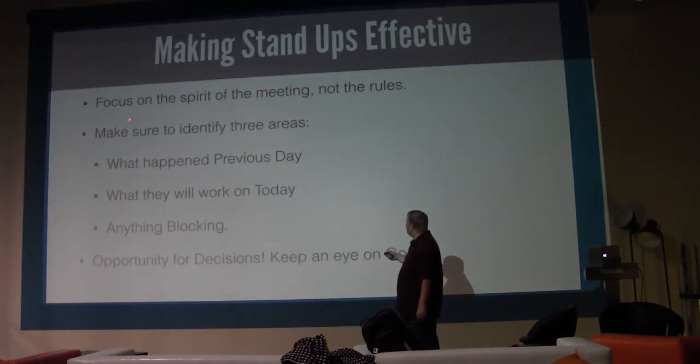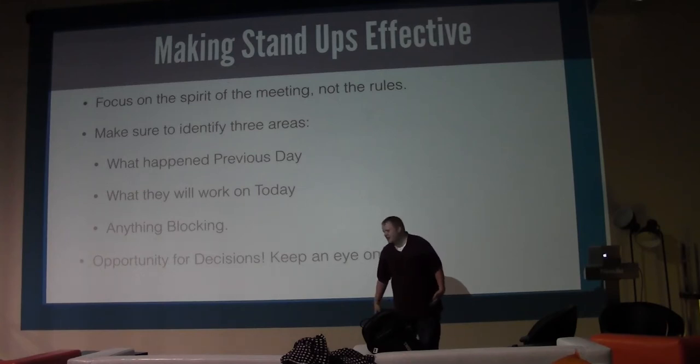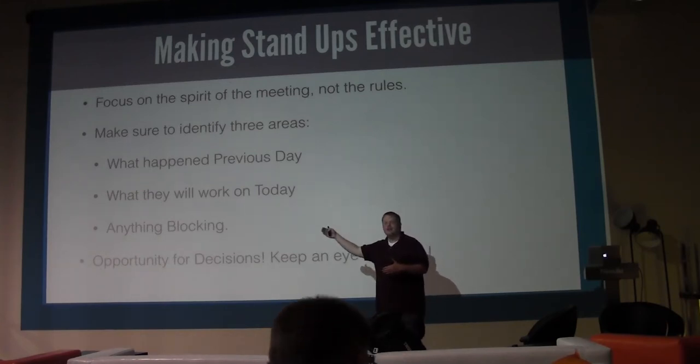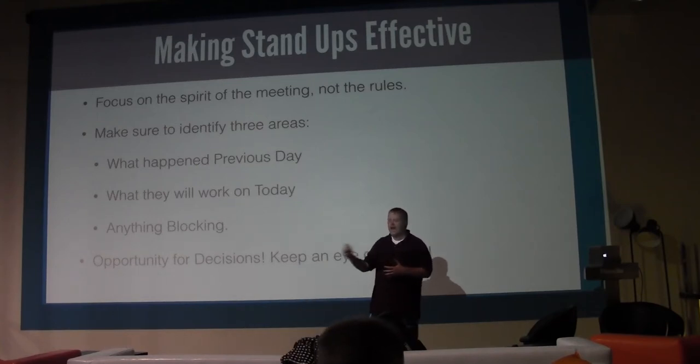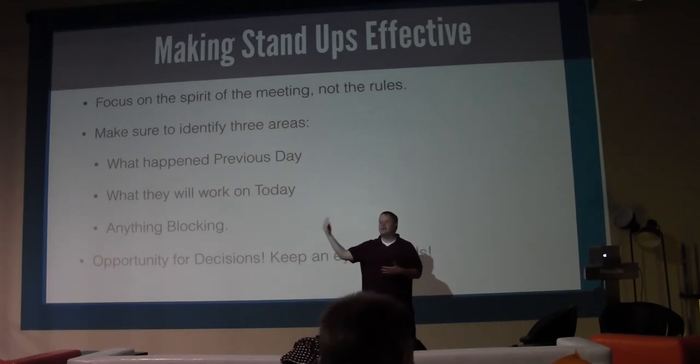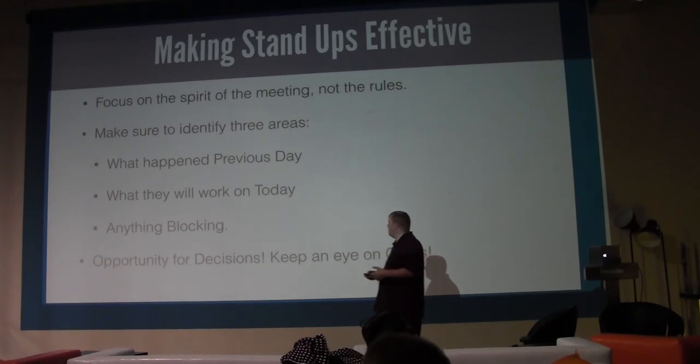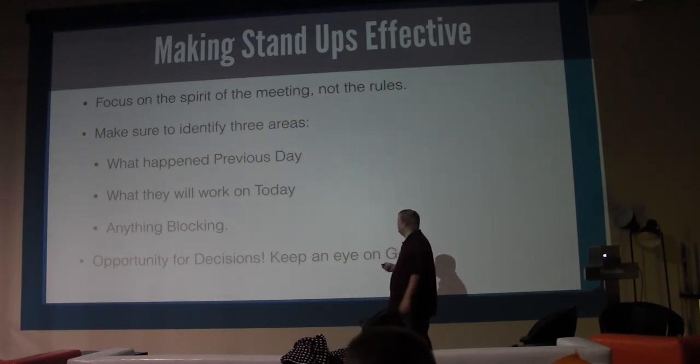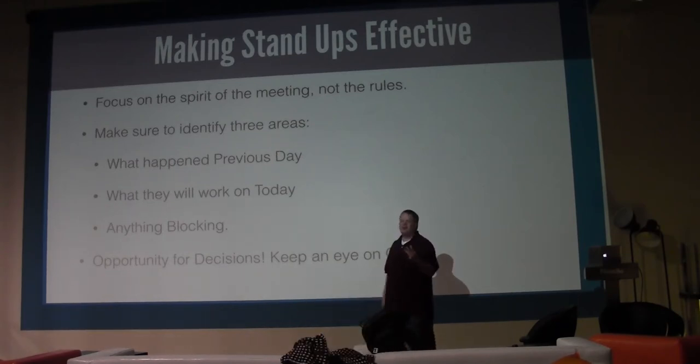For stand up, we focus on the spirit of the meeting, not the rule. We sit down in our stand ups, which is like blasphemy. We have a development team in Ukraine who we meet with and hang out with. So it's our morning, it's their evening, the end of the day. And we sit down at tables, you know, but we still keep them nice and short. And we basically go around the room and identify three things: what happened the previous day, what we're going to work on today, and anything blocking.